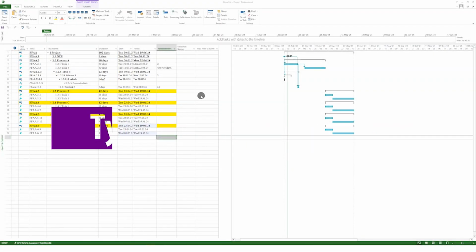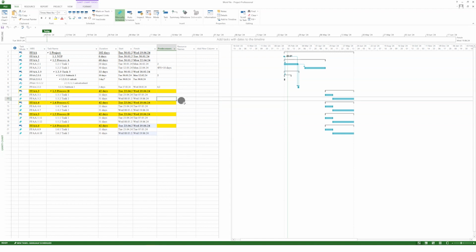Hello, in this video I wanted to show you the way to put the predecessors to the schedule. So the most common is just to put the predecessor directly to this field. So now it means that the task 2 can start only after the task 1.